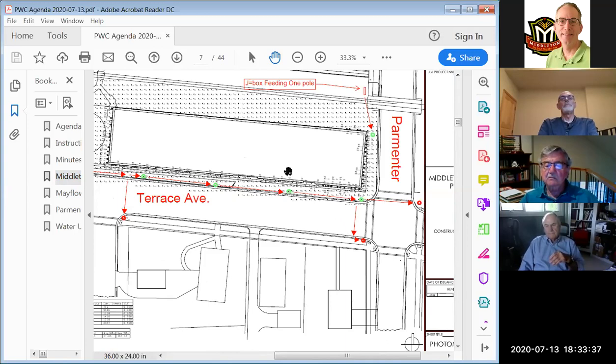And in previous phases of Middleton Center downtown, we've also taken out the low-level streetlights during construction and just left the bases in, which helps a lot with material handling and protection, so they're not getting dinged by construction equipment or hauling activities. But here, that's a pretty long frontage on a street, which isn't my primary concern as much as the intersections, which is really why we're here.